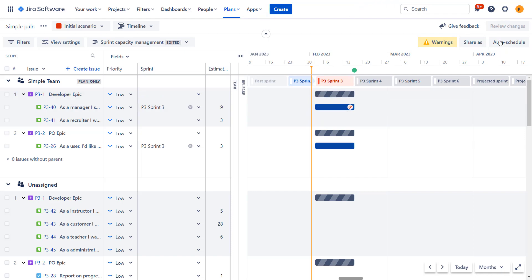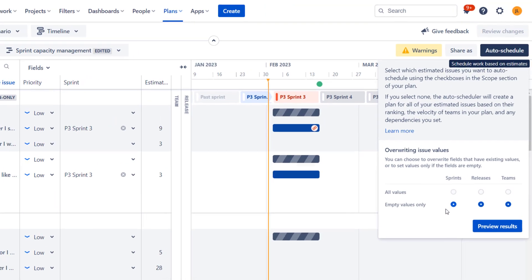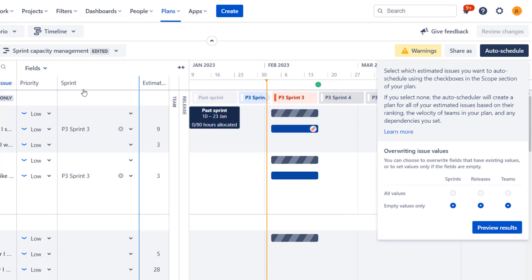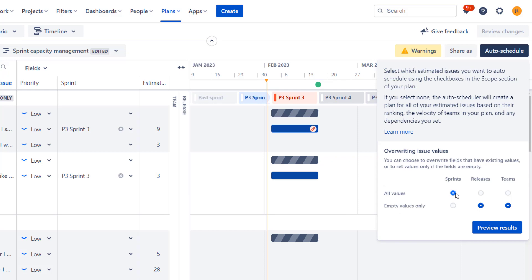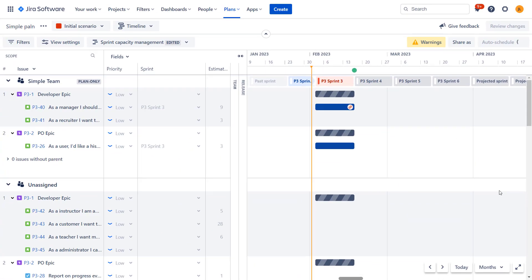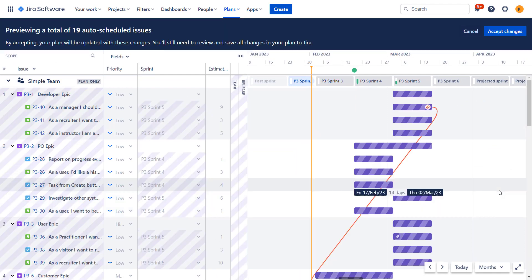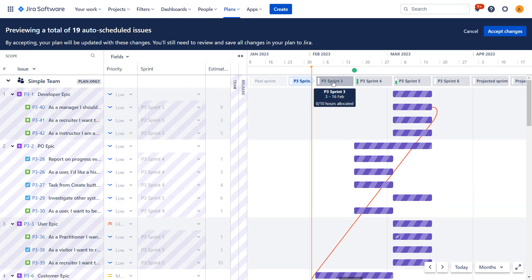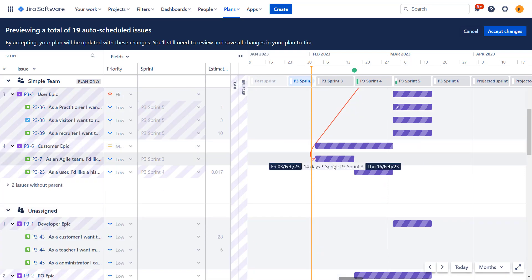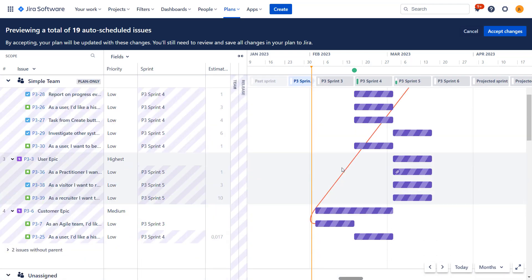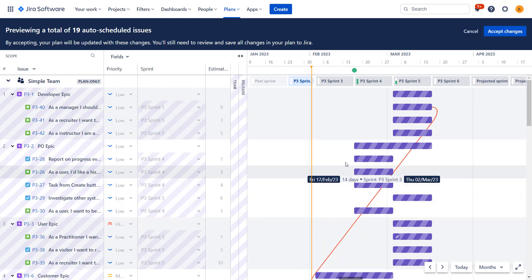We choose that only empty sprints should be updated. So we still were in red in the sprint three because these tasks already have this sprint, this field. So let's switch to all values for the sprints releases teams. We're not touching at the moment. It works in a similar way. Okay. Let's preview the results. All right. It looks completely different. So now we were actually moved so that nothing is in sprint three. Actually, I'm not entirely sure why it is like that, but let's look at this a bit later.